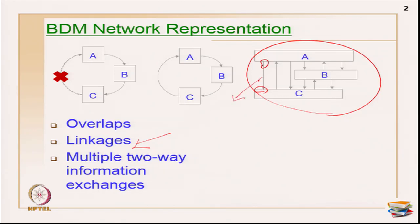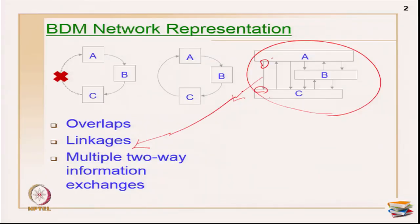For this particular linkage, A is a predecessor and C is a successor. I can start anywhere in the flow and I can stop anywhere. So it is not following the conventional finish-start, nor is it following PDM representations wherein you are able to show start-start, finish-finish, start-finish and so on. It actually directly connects the predecessor and successor at the relevant points. Links are primarily the shortest distance between any two activities, any two deliverables, or any two teams. So they are primarily called linkages, and these beelines are the linkages.